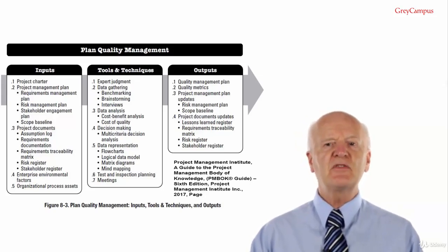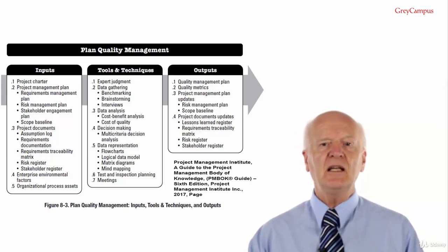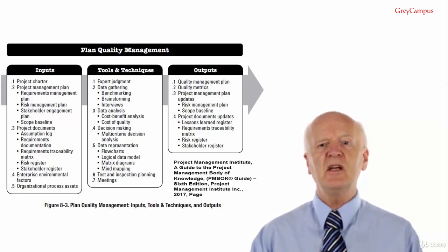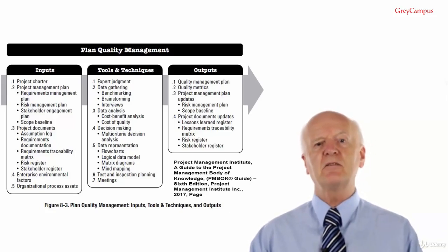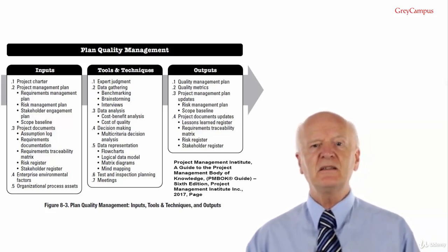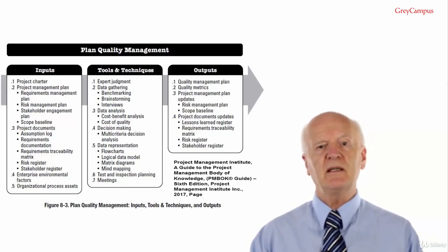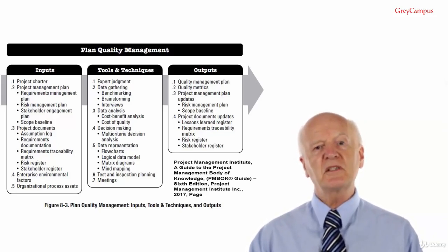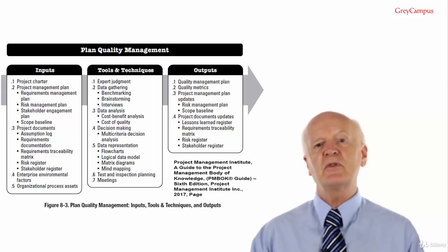The risk management plan. This provides the approach for identifying, analysing and monitoring risks. Remember that when you carefully plan your quality management, you need to know the risks that are likely to wreck your plan and how to control them. Some people believe that if you implement a quality standard, the risks magically melt away. This is not the case. In fact, if you implement a quality standard, you will increase some risks, especially if the team members don't understand the quality plan.